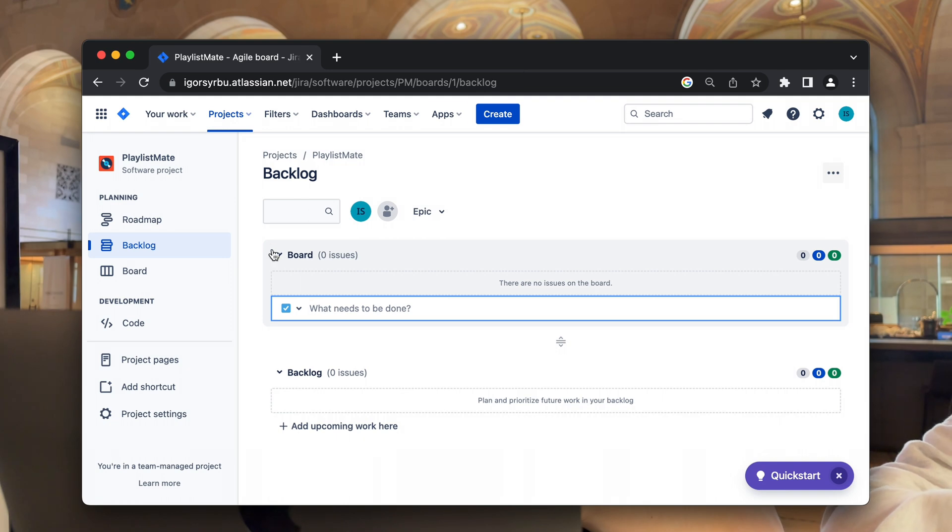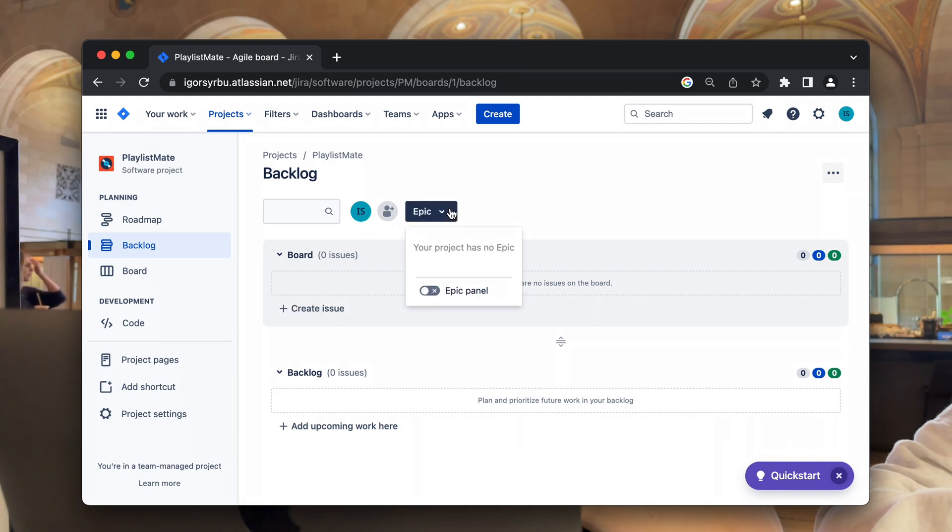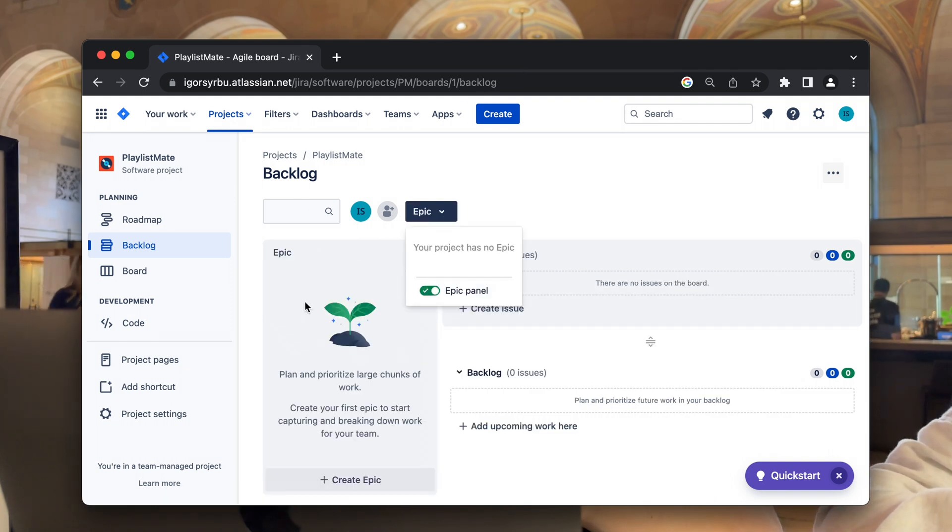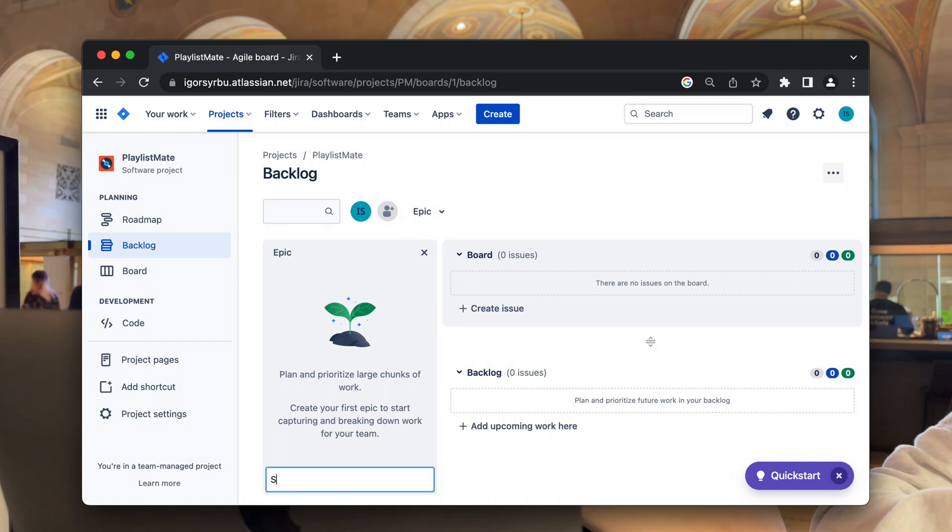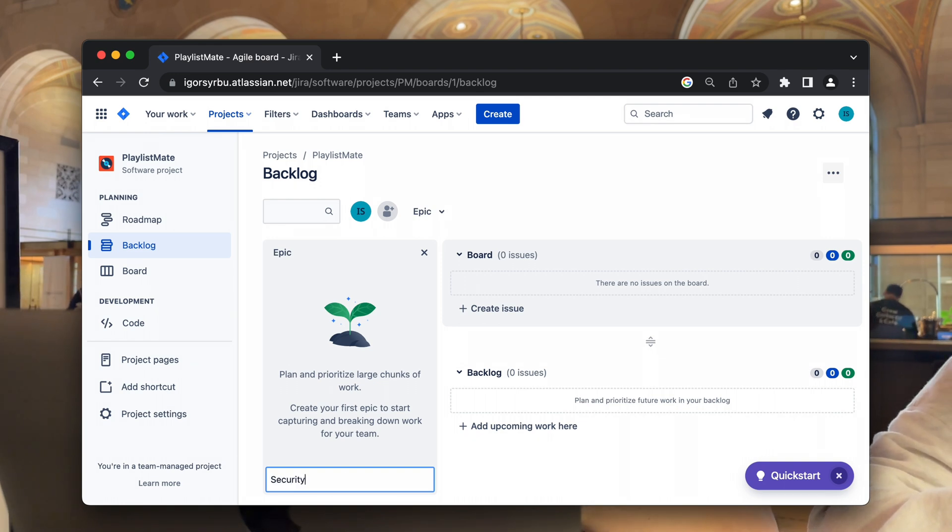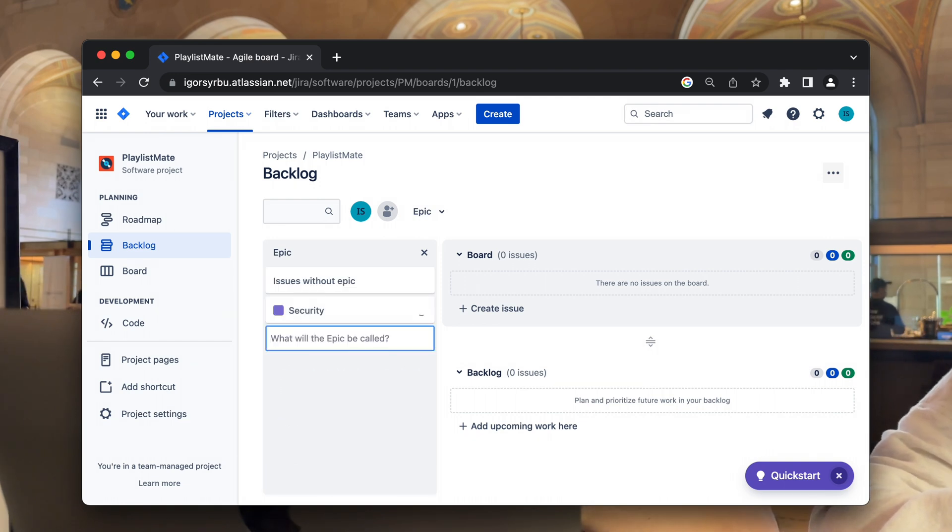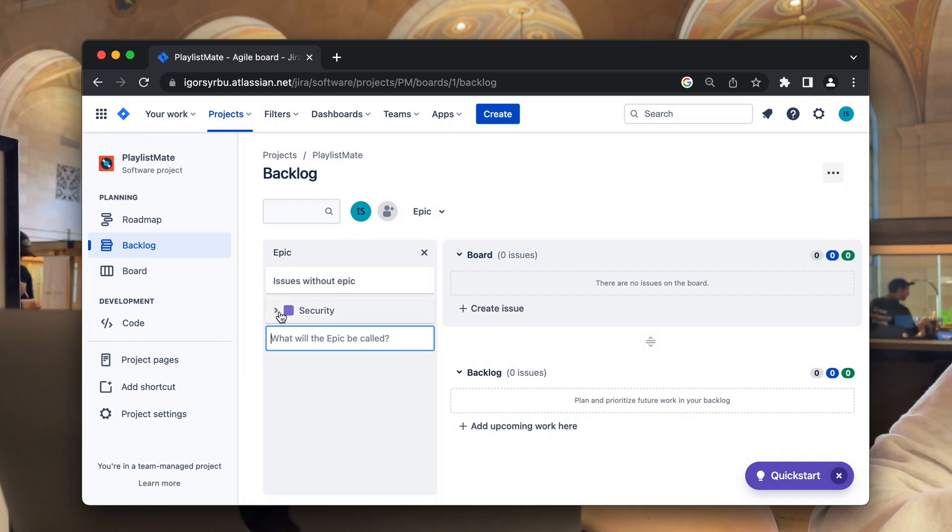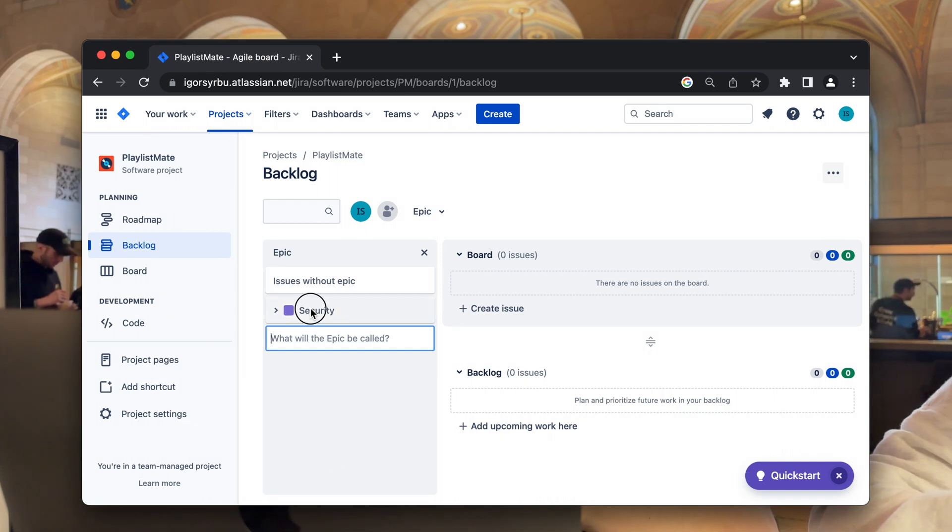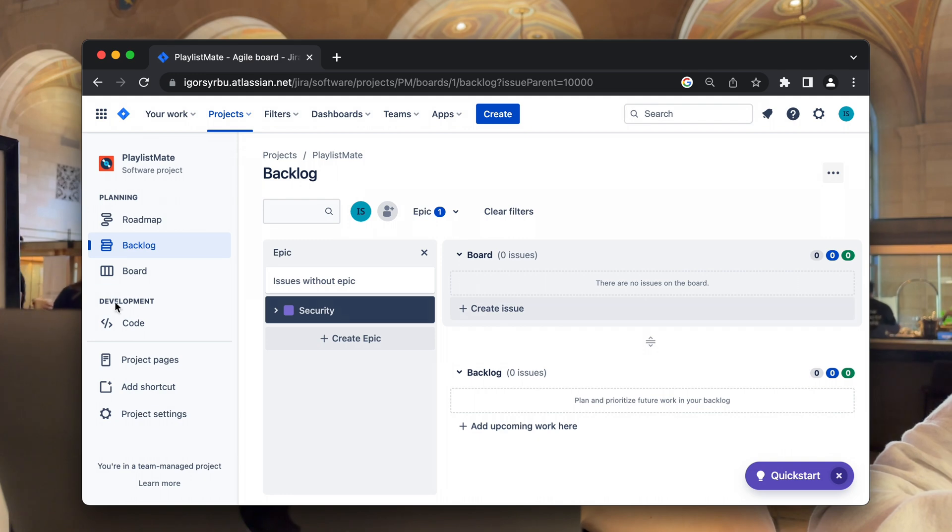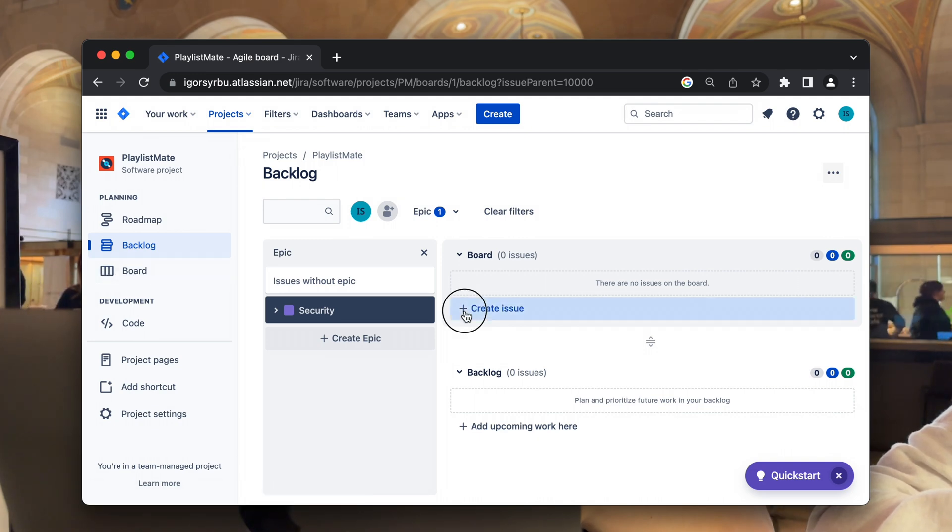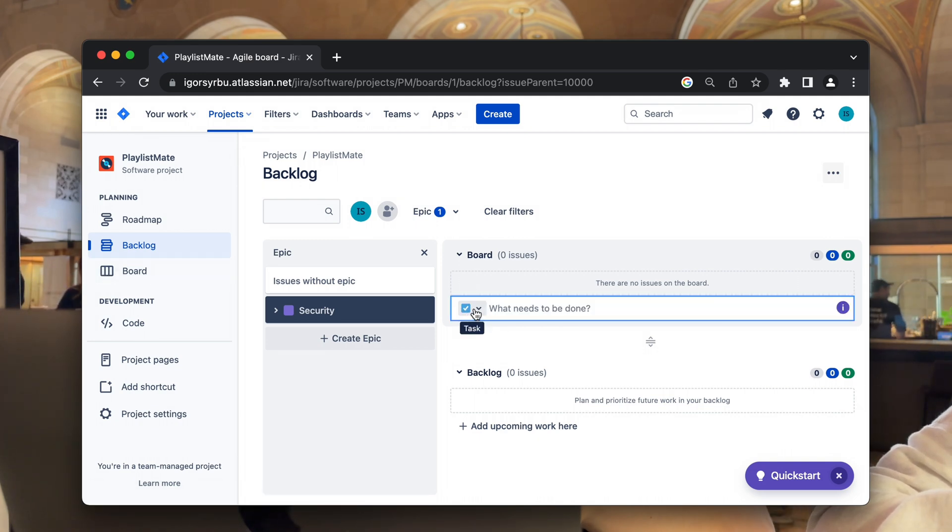Speaking of Jira issues, there are four crucial types that you need to know. An epic, which is some large piece of work. A task, which is the main component of the epic. A bug, I guess this one doesn't require definition. And a story, which would tell what we want to achieve from a user perspective. For instance, as a user, I want to log in using my Spotify account only.